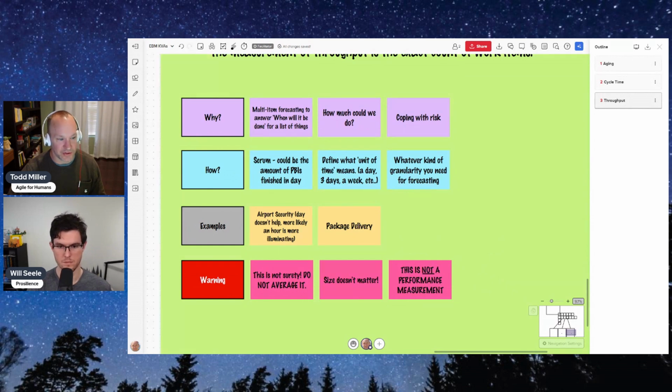If you start to try to treat throughput and increasing the amount of throughput you have, behaviors will follow. And when I mean that, people will try to just get as much stuff done as quickly as possible, and ability to innovate may suffer, which eventually will lead to your current value suffering, which will actually decrease time to market in the end. Often we see a correlation between a low ability to innovate and a low time to market. So although that might seem like a good idea for you to insert this as a performance measurement, we're telling you this is a really bad idea. Don't do it. It can very easily turn into feature factory, or just shoveling as many things over and closing things as fast as possible.